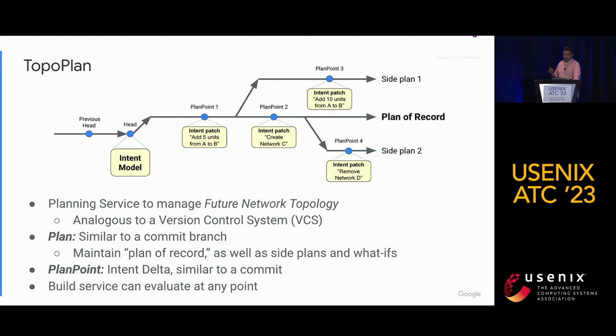And 3, it allows us to break down large, complex processes like live fabric migrations into smaller changes that are more aligned with smaller failure domains, and that can be rolled out gradually without putting the entire live serving fabric at risk. Now, in the case of unforeseen operational issues, we also have support to return to known good state, which in some cases might require us to unwind several stacked changes. Thankfully, we rarely use this in practice.